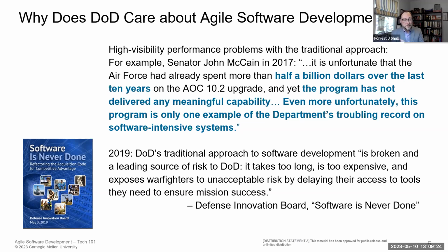But regardless of our opinion, I really like to point to this quote from Senator McCain, where he was looking at one of the troubled programs, the Air Operations Center 10.2 upgrade. And his scathing quote about it having spent $500 million over 10 years and not really delivered much in the way of meaningful capability whatsoever. And that, AOC was its own case, as many of our programs are. But I would say that's not the only program where we saw this type of outcome.